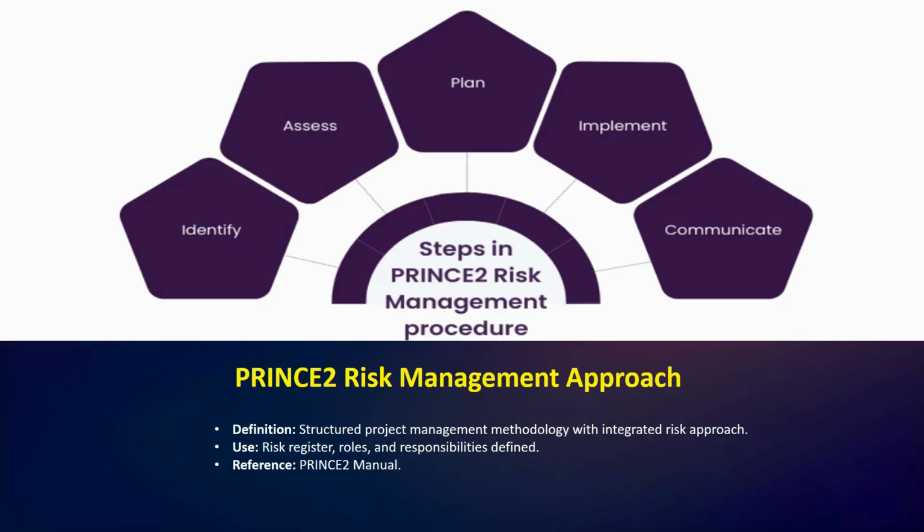For example, the risk manager is responsible for managing day-to-day risk, while the project board handles strategic risk. This is a very structured approach that ensures risk is integrated into every stage of the project. Okay, so under definition: structured project management methodology with an integrated risk approach. It uses a risk register, and roles and responsibilities are defined.